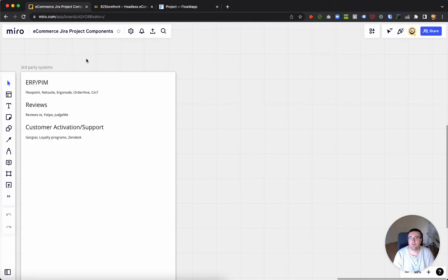Wrapping up, I wanted to return to the part with Jira, because we're discussing components that are used in a project. So for our project organization, we use Scrum with sprints in Jira. Those sprints are week long. Each task is currently assigned to one or more components.